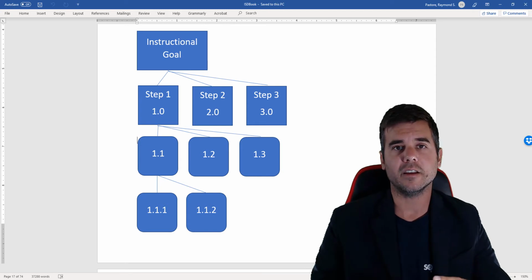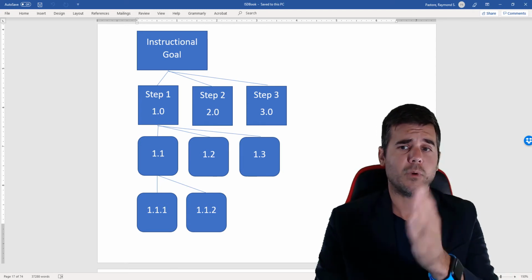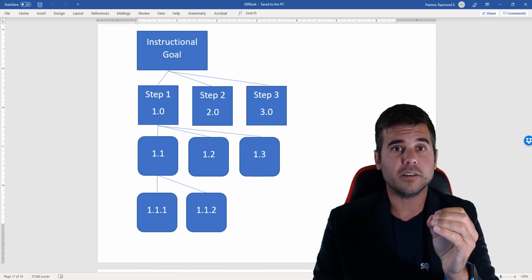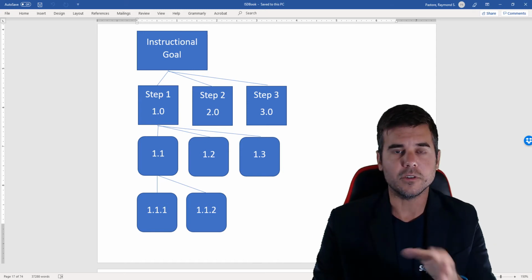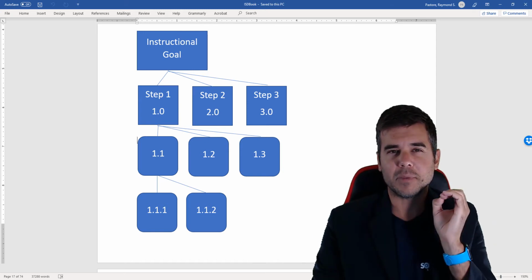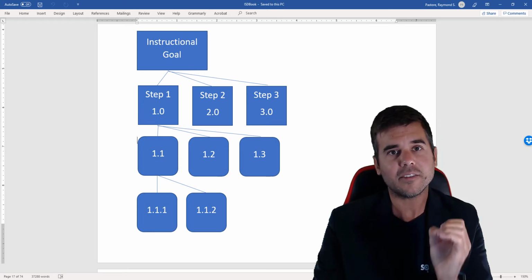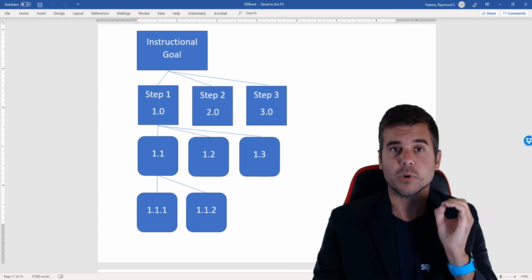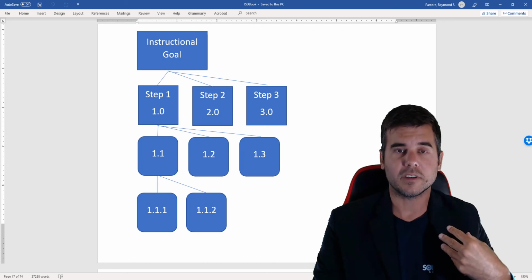It must be done. I don't mean that you have to do step 1, 2, and 3 all at once, because if you're developing training, you might be able to do step 1, develop training on that, and get that rolled out before you start on step 2. But before you start designing and developing training, step 1 has to be done and approved by your client so that you don't run into scope creep or rework when you go into design and development and realize you're missing a bunch of content.